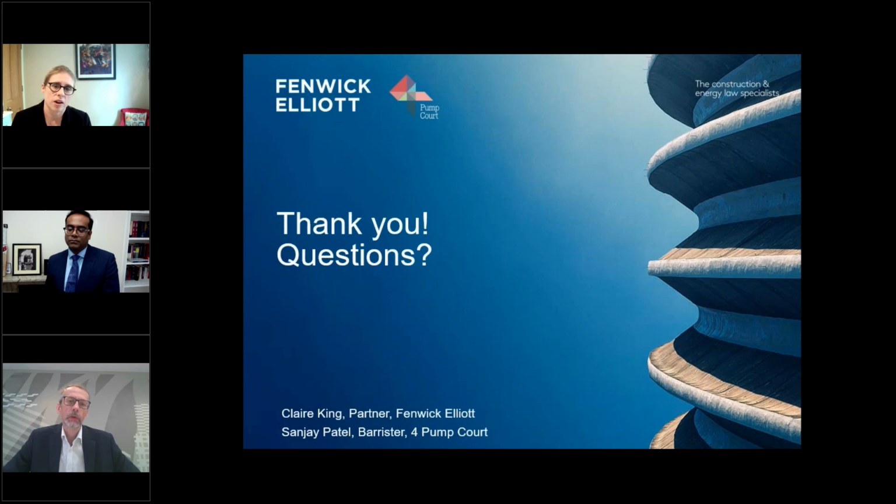And on the delay side, I know some experts I was speaking to recently said they do both, so they will do a prospective and a retrospective, and then hopefully they match up, but that's very rarely the case. But just so the adjudicator feels more at ease, or to avoid those sorts of arguments. That's not on cost, that's on delay, but it is something that's worth thinking about. I think that's absolutely right, and I don't think it's wrong for you to say that from the practical perspective, because when you're putting forward these claims in adjudication, you've got to think about the person you're putting them forward to, the adjudicator, and what makes them feel comfortable.